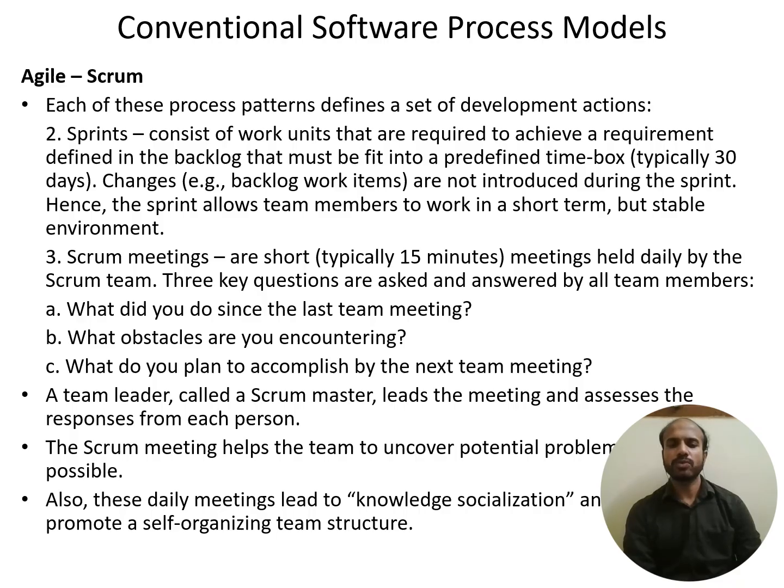What did you do since the last team meeting? What obstacles are you encountering? What do you plan to accomplish by the next team meeting? These three questions will be asked and answered by all the team members.